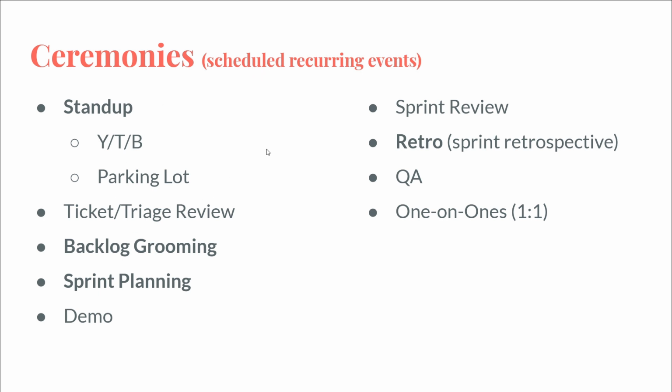Backlog grooming is something that can either be done with the entire team or ideally your product owner will go through the backlog and clean up the backlog, remove things out that need to be archived, stuff that's no longer relevant. They will reprioritize stuff and move things around so that the higher priorities are at the top and they're prioritized well. And the closer you get to the top, the more granular the prioritization has become.